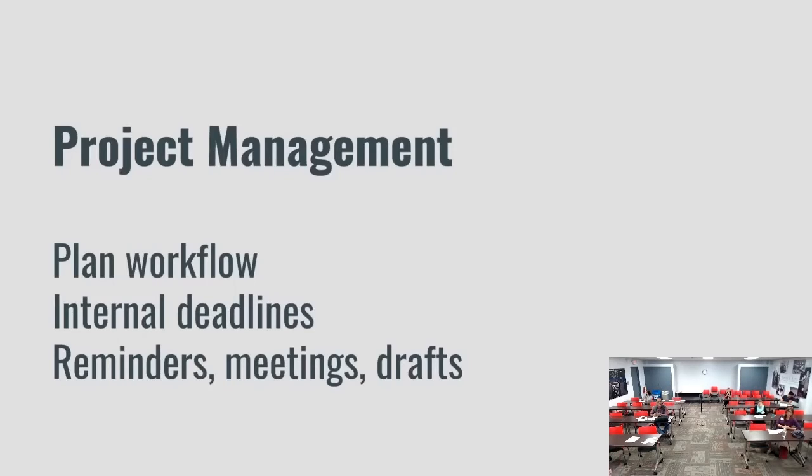If you have a large project, having smaller pieces along the way is the best plan to actually get to your end goal on time. Procrastination happens to the best of us, even if we don't like to procrastinate. So having the shorter pieces of the project due along the way with an internal deadline makes sure that you are moving forward and you're on track and you don't end up against a deadline that you can't meet.